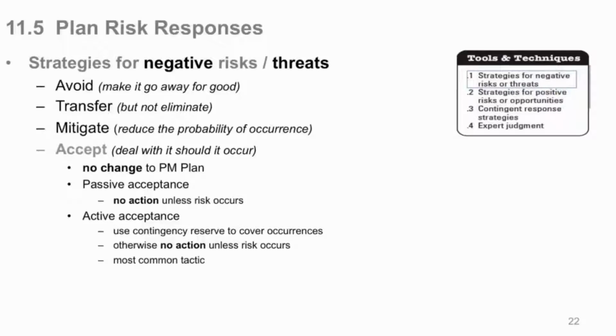Transfer, nobody wants to accept liability and help us, so it's still ours. We can't transfer it. We can't really do anything to mitigate it. If it happens, therefore it happens. So we accept the risk. Now, no change to your plan.